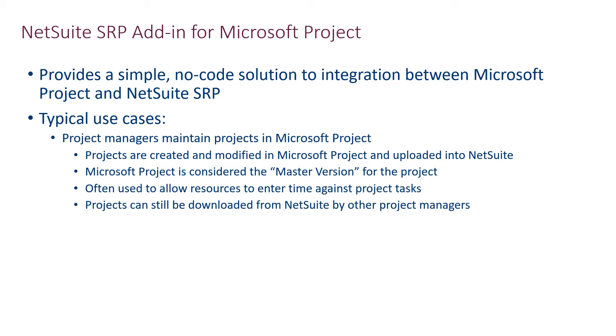The first use case supports users maintaining their projects within Microsoft Project. In this scenario, the projects are created and modified within Microsoft Project and uploaded into NetSuite SRP. The Microsoft Project version of the project would then be considered the master version, and the project is uploaded into NetSuite for supporting other functions such as time entry, billing, and resource allocation and utilization.